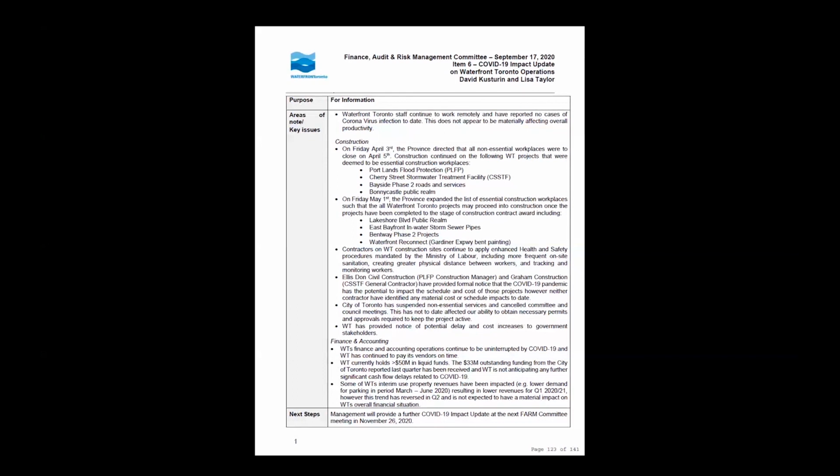We have builder's risk insurance, so if something that we construct is damaged and needs to be reconstructed, the builder's risk policy would apply. And then we have errors and omissions insurance. I'm not sure that there is an insurance policy, maybe apart from our performance bonding, that would actually apply to anything related to potential COVID disruption. I'm just not sure that there's any insurance that we've had in place on that front. So we'll look into that, if there was a shutdown, whether or not any of the insurance would apply, but I'm not sure that it would. And similarly, I don't think that Ellis Don, under their general liability, and we're carrying the builder's risk, not Ellis Don, so essentially they've got general liability, I'm not sure that their insurance policies would cover COVID-related impacts necessarily.